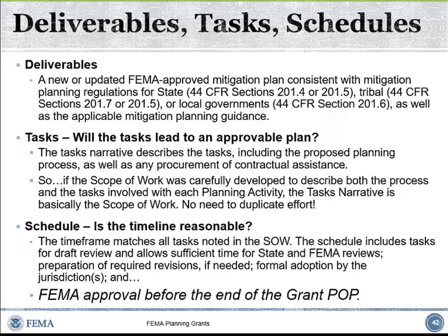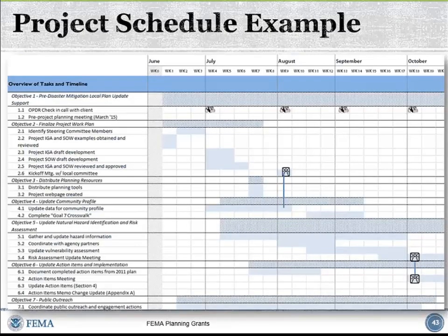And again, those tasks are organizing and getting your planning team together, reviewing the existing planning information that's out there, determining priorities, looking at your risk assessment, developing additional risk information if you need it, developing mitigation strategies, the public adoption process, and over it all is your public engagement process. So you need to schedule enough time to do each one of those things, okay? This is just a great Gantt chart showing an actual hazard mitigation planning process timeline.